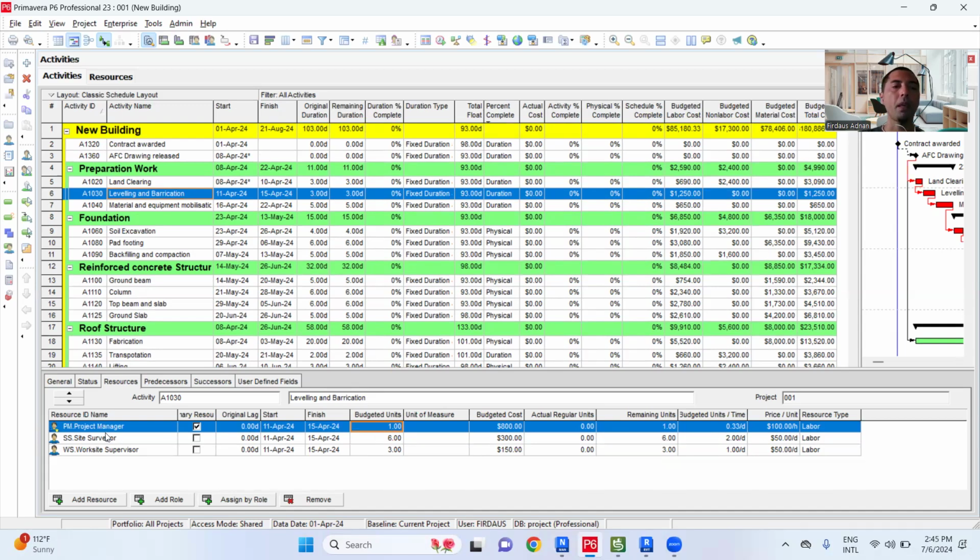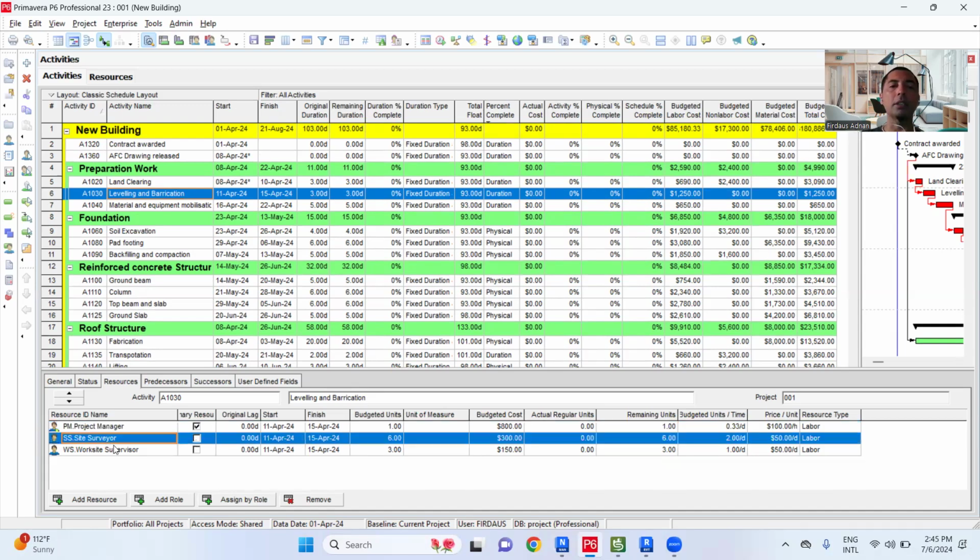Understood? And also this site survey. The site surveyor must attend every day, and he has to organize manpower, unskilled or skilled labor, to complete this activity. We don't consider him part-time; we consider him a full-time worker. So how many days? 3 days. And how many surveyors do we consider?